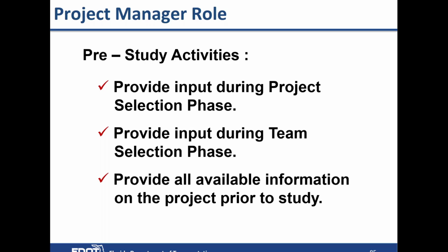And then also to provide all the available information on the project prior to the study, so that we can send it out to the VE team for their review prior to the study. So they're a little bit more familiar with the project than just showing up green on Monday morning of the study.